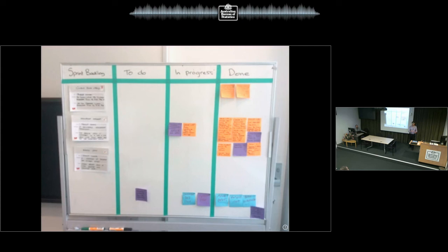Scrum, on the other hand, what happens is you pull these three user stories in at the beginning of the sprint, and then if anything comes to you during those 2 weeks of the sprint, you say, thanks, let's talk to the product owner about it, maybe it'll go into the next sprint. So the best you can do is maybe on average a week, and that delay may not be tolerable for defects.